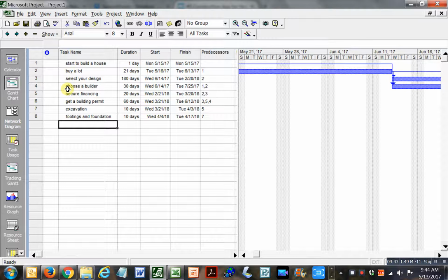Okay, then you're going to do the framing of the house. All right. And that doesn't take very long. We'll say they could do it in 8 days. All right. And they'll do that obviously after number 8. Makes sense, right?